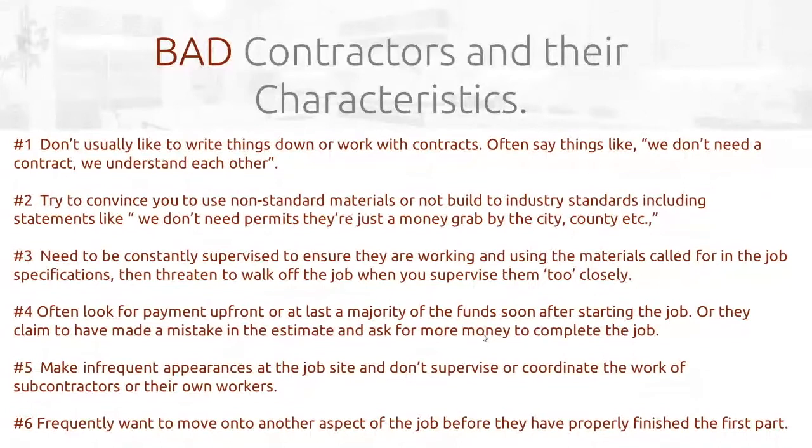We don't do permits? I'm sorry, the general contractor is in charge of doing the permitting. They should be assisting you from beginning to end with the permitting process instead of grabbing the money and running off with it. That should never happen. Make sure it's the right type of contractor, professional and buttoned up, who says, "I got this, I'm going to handle your permitting process." They know what city, they know who the contact is, and they communicate to you what's going on with the permitting process.